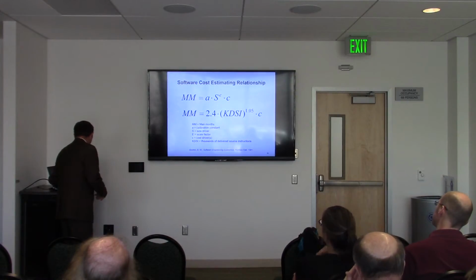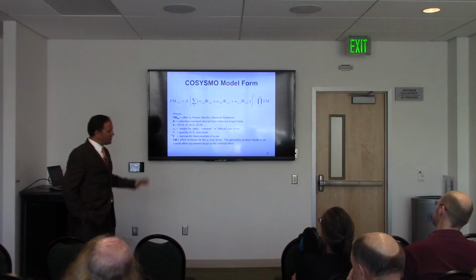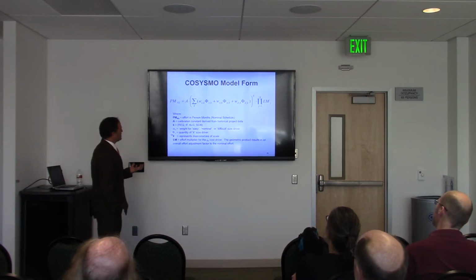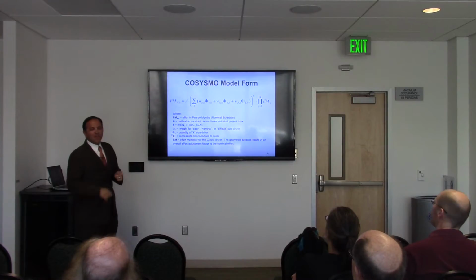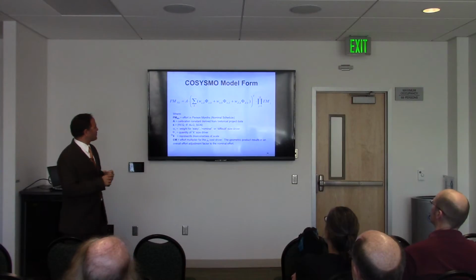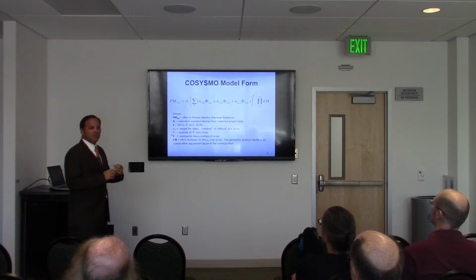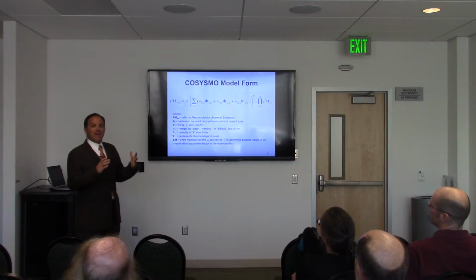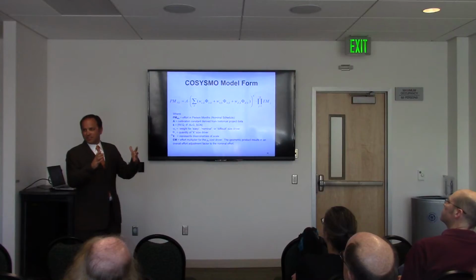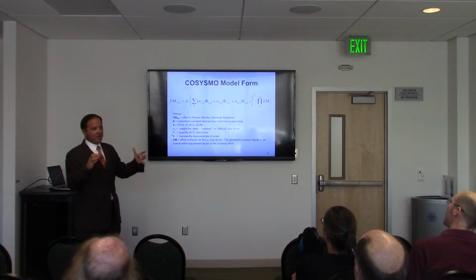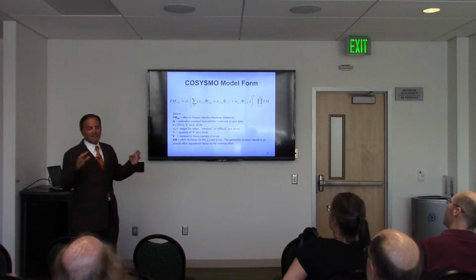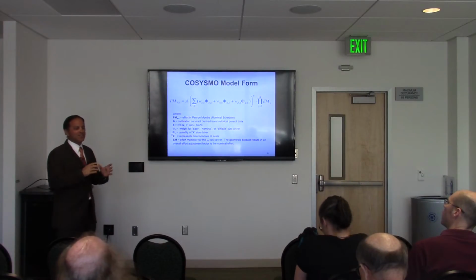So building off of that, here's my cost estimating relationship. Let me walk through it from left to right so you can appreciate what are the things we're capturing in a system engineering context. So on the far left, person months, and the subscript for NS is nominal schedule, meaning that there is no dramatic schedule compression going on in the project. We know that projects get compressed all the time, right? We also know that foolishly, some projects are given much more time than necessary, okay? That's another inefficiency that is hard to deal with in cost modeling.